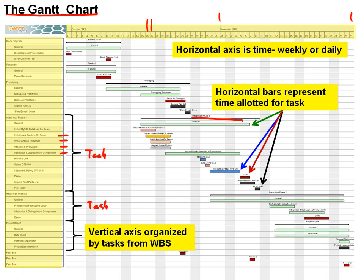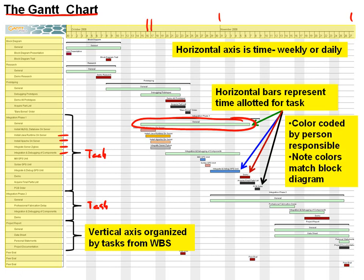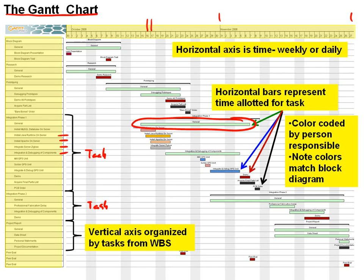Horizontal bars on the Gantt chart give the time allotted for each task — when it will begin and when it will end. The horizontal bars are color-coded by the person responsible. So by looking at a Gantt chart that's done well, not only do you know what you should be doing at any given period of time, you also know who's responsible for it. Notice the colors match the block diagram, so there's this holistic vision for putting project management together.